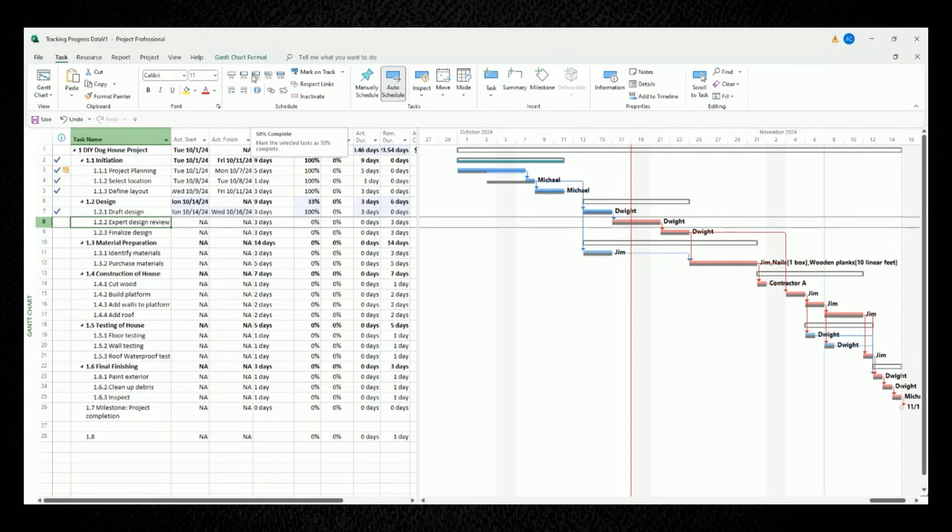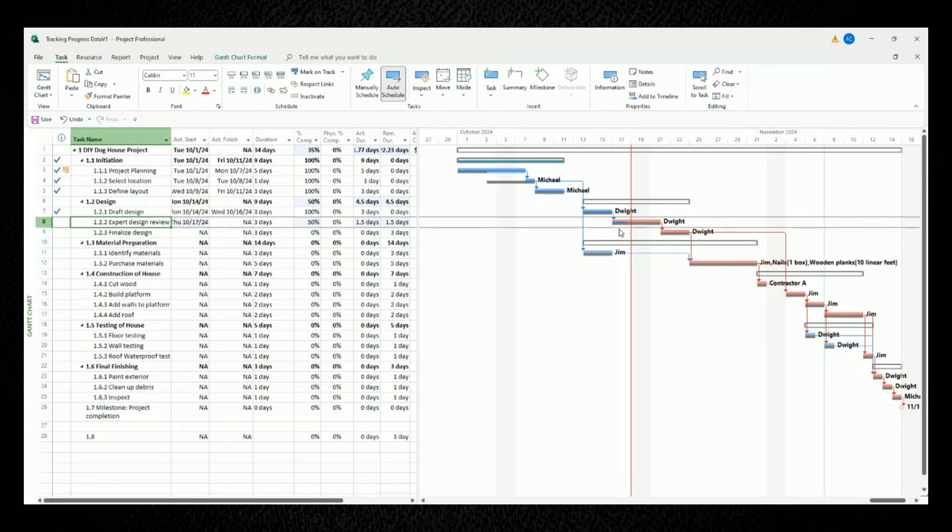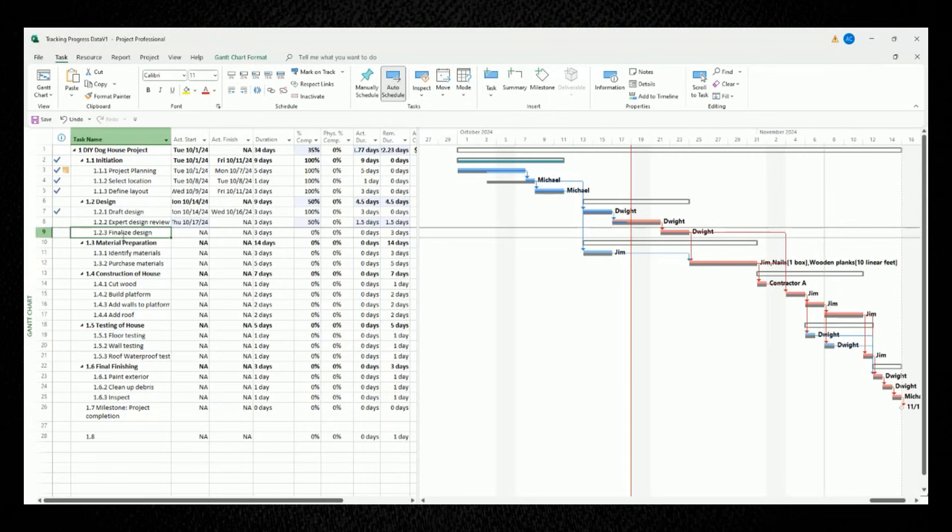Now, for our second task of expert design review, let's say that we're 50% completed with getting it done. Let's left click the button for 50% completed in the schedule panel and you should also see the blue bar appear for this task in the Gantt chart. Of course, it only appears halfway in the overall bar because it's only 50% done.